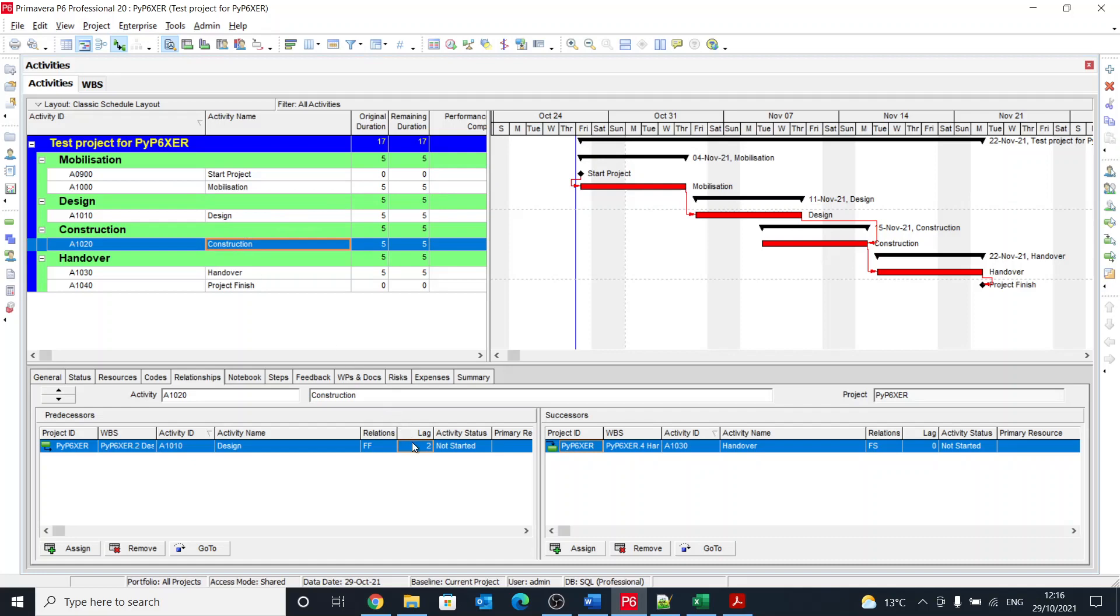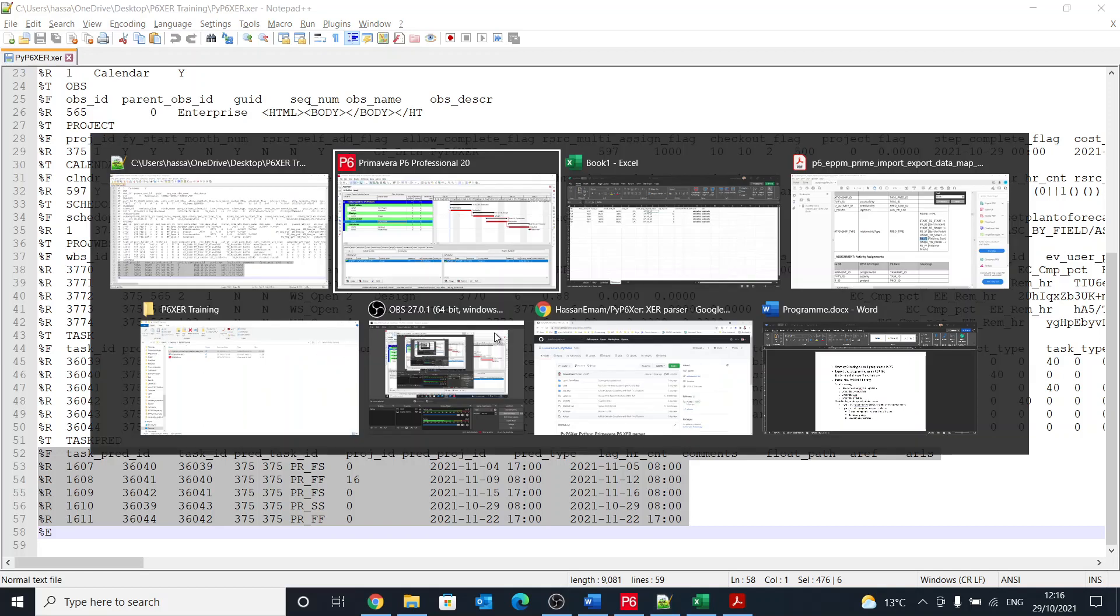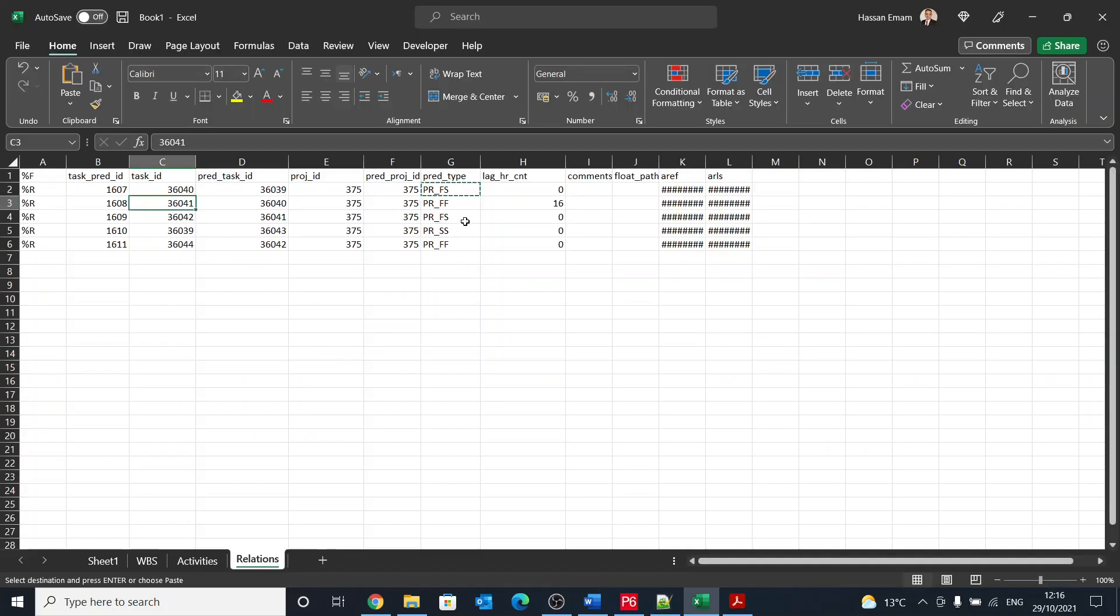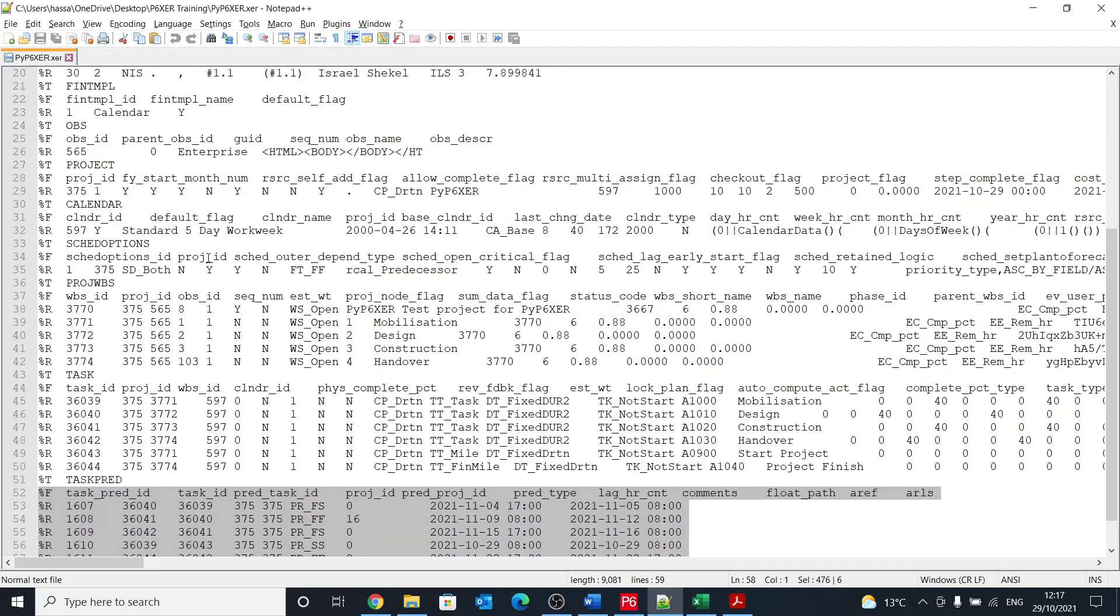And its predecessor is design, and we have made construction link to design with a finish to finish two days. But in P6 the way that it is stored, it's not in days, it's in hours. That's why you found 16 hours, and this 16 hours is related to the calendar.